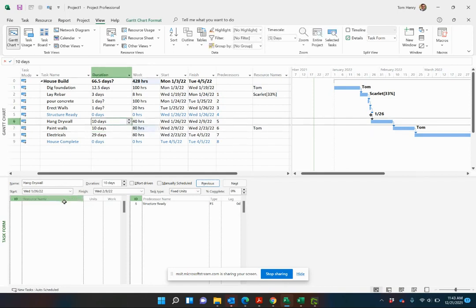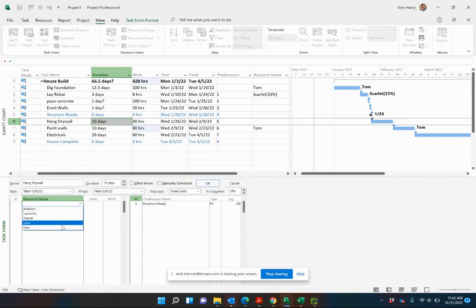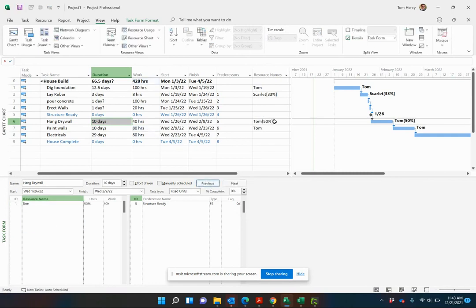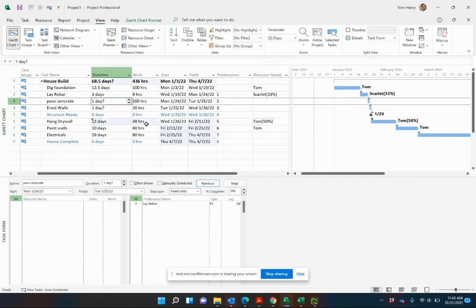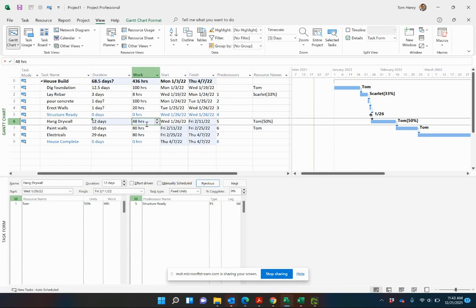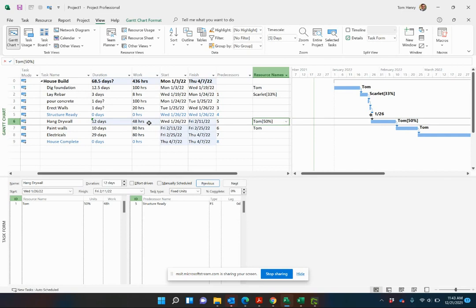Do the same thing for hang drywall. Put Tom on there as well. You can see Tom's working 50%. We supply two variables. Microsoft Project calculates the third. By estimating the duration and the work, Microsoft Project is always going to calculate the units for us. If we increase the duration, you see the work is actually going to go up proportionately to the units of that particular resource. We put in an extra two days, add an extra eight hours, because he's only working part-time, 50% units, which is four hours per day.